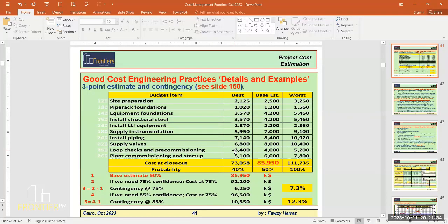It was a mall. It was a very big mall, so the bulk of it was for the other disciplines and not for the civil works. For sure, that's quite natural. The definition of these MEP items is very limited at the beginning, and the detailed design brings the real world, the real quantities. And even when it comes to the specification, that makes this item quite different from the conceptual estimate.